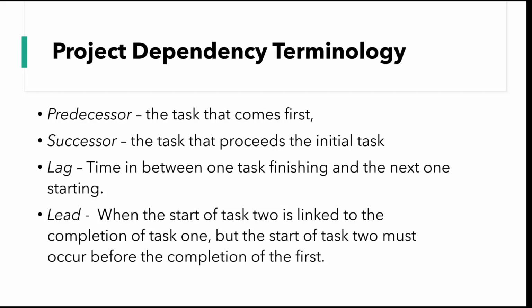There's a term called the lag, which is the time in between one task finishing and the next one starting. And then you also have lead, which is when the start of task 2 is linked to the completion of task 1, but the start of task 2 must occur before the completion of the first.